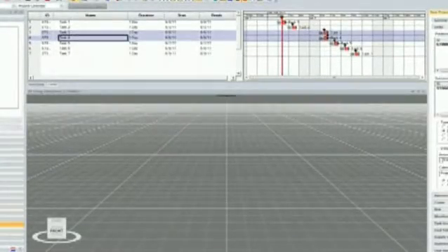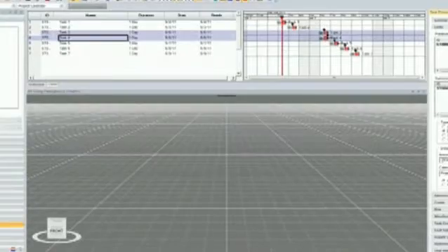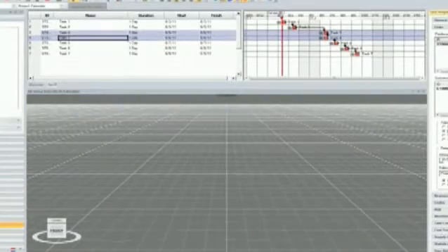And carte blanche, every single time I've ever seen a customer do this, or us internally, you find out when you visualize it that it's not right. Right? There's issues with logic, there's issues with things starting too soon or too late, and so you want to go fix those. Well, in other systems that you're probably used to, you've got to then handwrite those down, go back to Primavera, fix all the stuff in Primavera, pull it back out, stick it back in the system, and render it again, because then what you fixed now caused other problems in logic.